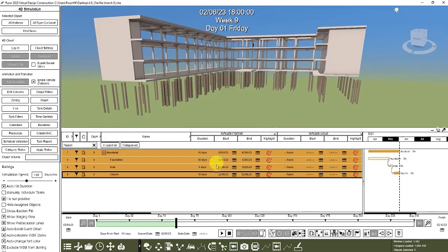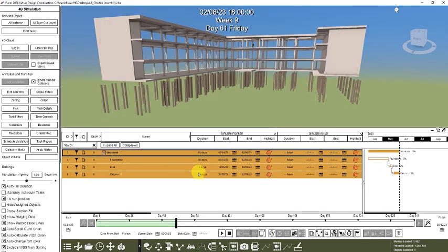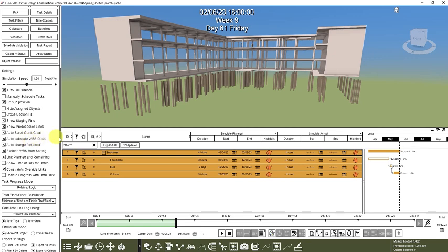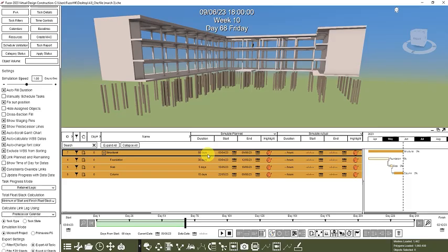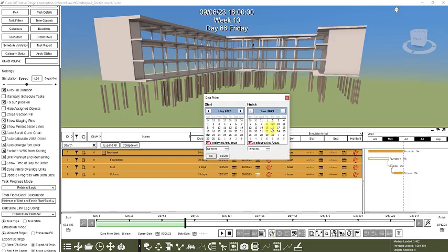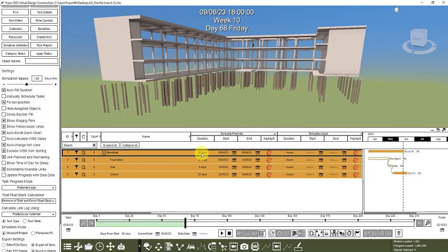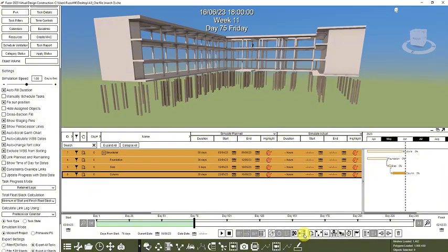So when you click this, the dates are automatically updated, and notice that the duration here is the sum of the durations. So here in settings, the auto calculate WBS dates is enabled, meaning when we change this date to June 9, click OK, then the duration for structural will automatically change to 50 days. But when we disable this, for example, let's change the date to June 16, click OK, duration for structural doesn't change.